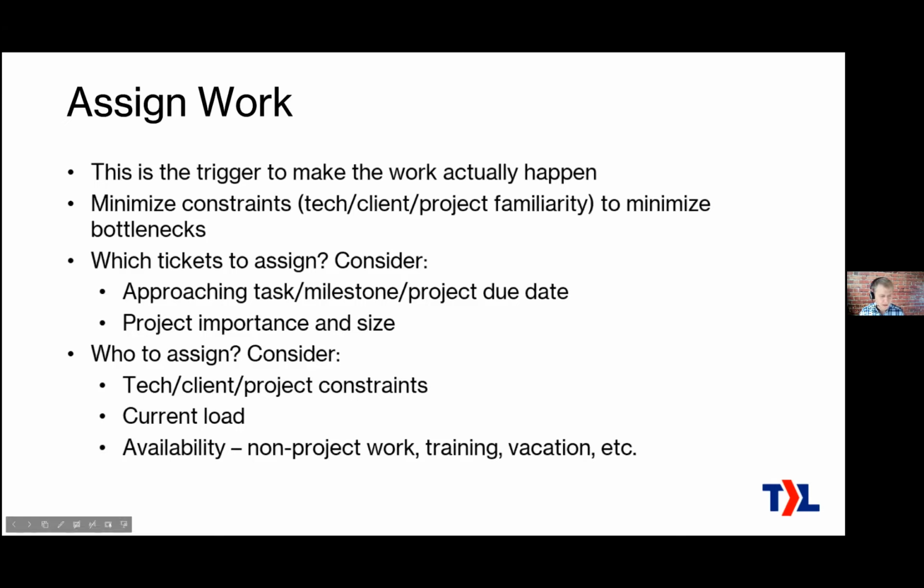I should also say, assigning here is a typical usage. We say it because it is easiest. This is probably close to what you're already doing, so it's easy to keep doing this method, but it's not actually the pure Kanban method. What is even better is to not assign the work at all, to just have one big queue of work, and all of your engineers work from the same queue. When you do that, you don't actually have to assign it. As a project manager, you just order that work, and the engineers always pull from the top of the list when they're ready to take on some new work.